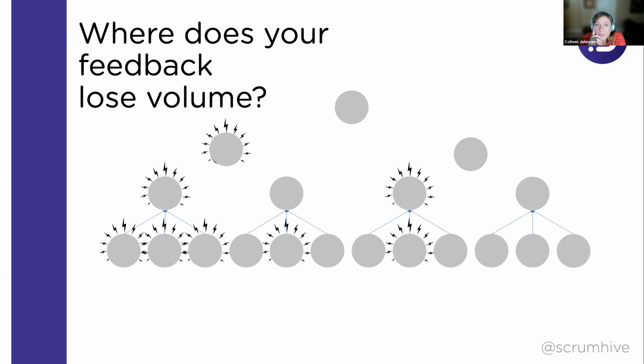Has anybody run one of the retros? There's a retro format where you make two circles. You do your feedback and talk about what you're going to change, and then you separate these into what's in our control and what's outside of our control. I like this, except I ran this once and almost every sticky went to what's outside of our control. It was a really hard retro to not end on a depressing note, because the team was like, all this stuff is broken, all this stuff needs addressing, and we can't do anything about it. That's a great place to look for an opportunity for these larger scale retros.